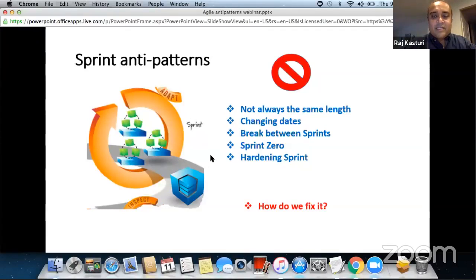How does the Scrum Master deal with undercommit and overcommit? Basically, like I mentioned, point the team to the data. Let's say last sprint our velocity was this, right? And this many items have been completed. And this, compared to that, will you be in a position to complete it? So the Scrum Master needs to ask the question.